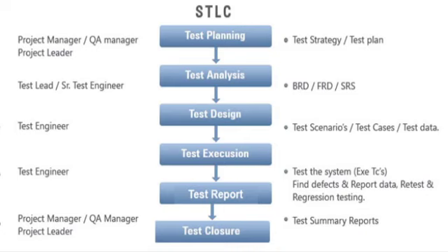According to IEEE 829 standards, the test plan will have 16 attributes like test plan identifier, introduction, test items, features to be tested, features not to be tested, approach, testing tasks, etc. Like this, we have 16 attributes which define the plan of testing an application in detail.